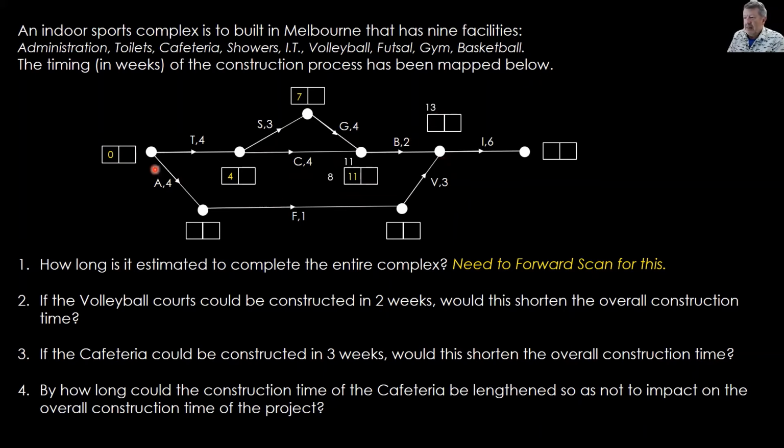So it looks like we need to come back to get the other number here. We need to come back down the bottom. So we'll work. 0 plus 4 is 4. 4 plus 1 is 5. 5 plus 3 gives us 8. It goes on the bottom.